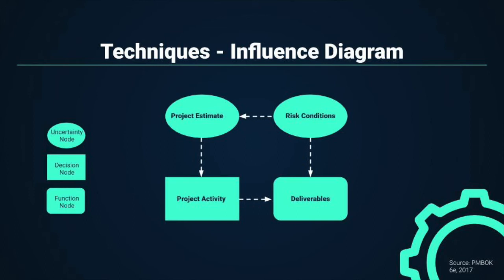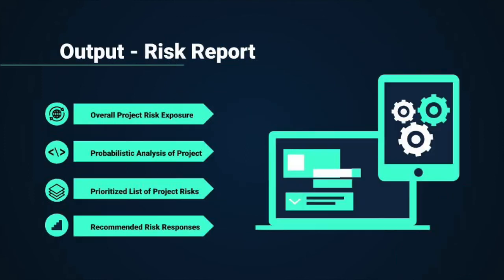You put it together and then you would evaluate it using some kind of simulation again, like a Monte Carlo analysis, to delineate which elements of the diagram have the greatest influence on key outcomes. So the outputs from an influence diagram could actually be represented with an S curve or a tornado diagram mentioned earlier. A quick word about outputs.